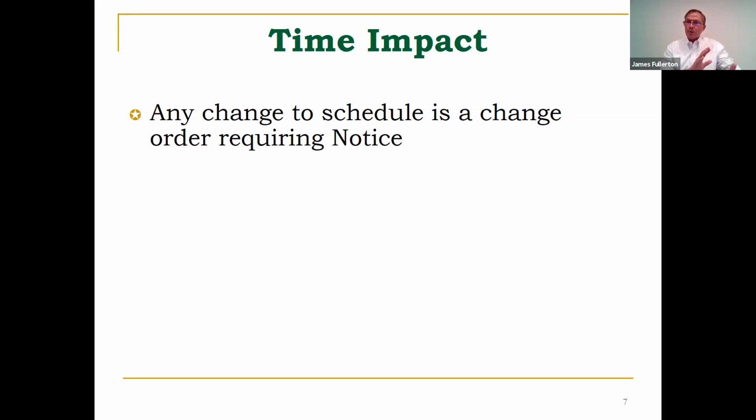There are at least two components to every change order. You got to explain the change in the scope. You got to explain the impact on the schedule. And if you don't put it in that change order, you are waiving that claim to additional time. The other point is you often have to do that in a defensive posture.